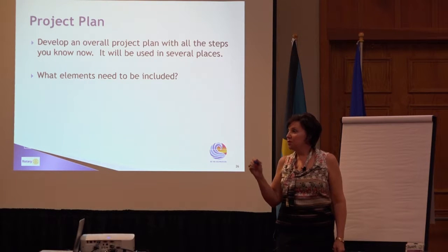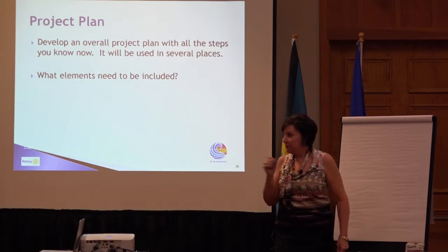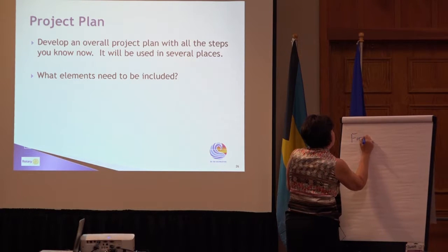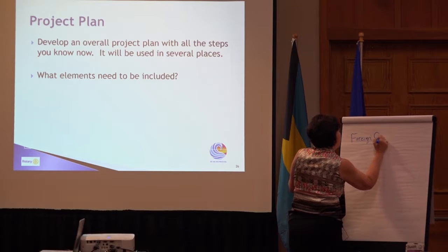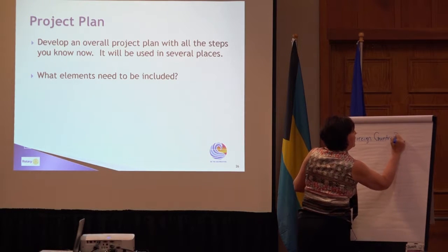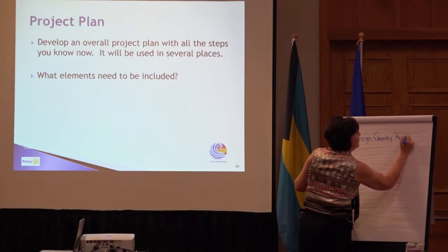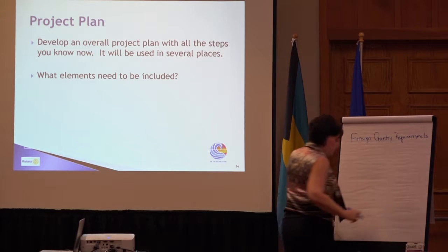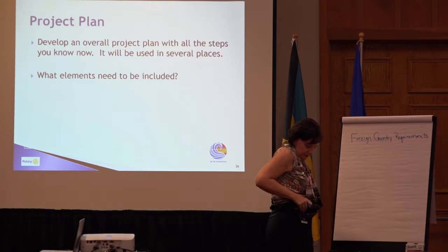So foreign country requirements? Yeah. I think in that case you would say that yes, we need an NGO, and the reason is that the country has specific controls for listed NGOs. In order to be an NGO in that country, you have to apply, you have to show stuff, you have to have the right bank account and the right credentials, and you got to sign a bunch of forms.